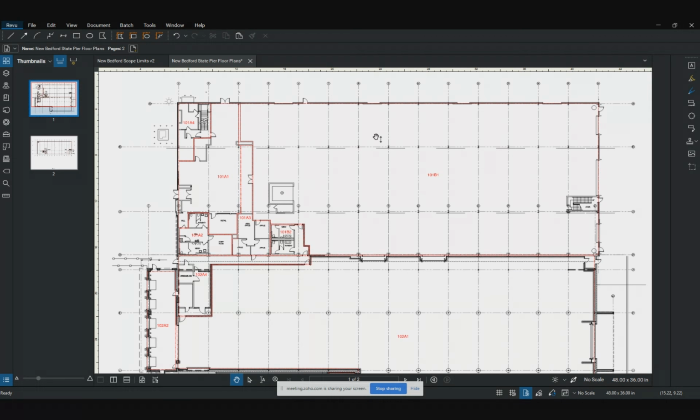We have a method with our cost estimator to price this piping by square foot. If I give him the square footage of this whole thing, they have some magic way of telling me it costs, I don't know, $2 a square foot to make sure that this area has a sprinkler system. So that's another cost table that we have.